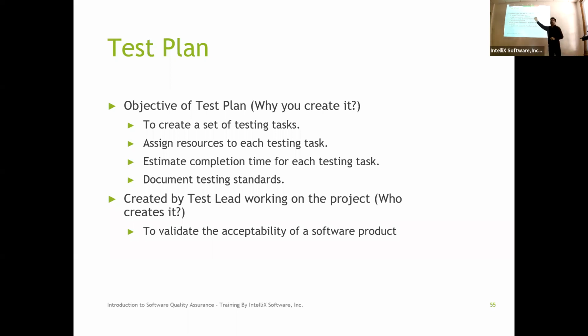What exactly and why do you even bother creating it? So the first one is you want to understand what do I need to do in order to test the system. What are the tasks I'm going to perform? How many people will I need? How much time will I need? What tools will I need? So you need all of those things. The whole purpose of that is to validate the acceptability of the software.